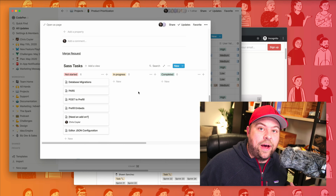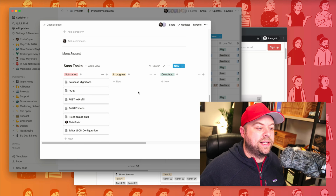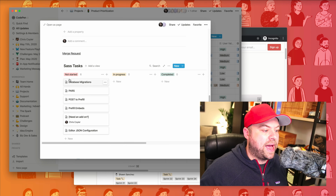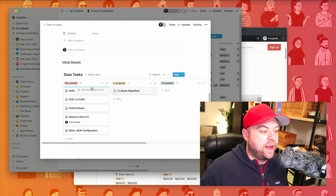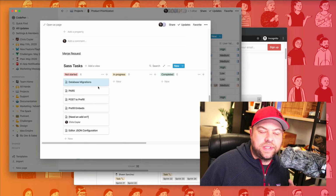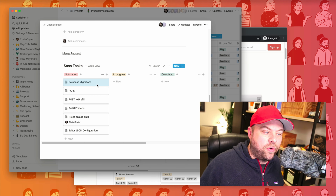Let's write it down. Maybe sloppily at first, but then we'll move it into a task board. We'll split it up into individual things that people can work on, and as they do it, they can grab it and tell the world that they're working on it. And so these cards become not just tasks, but also documents for that task.